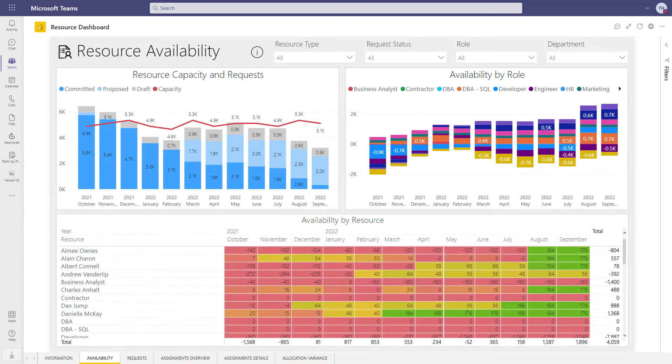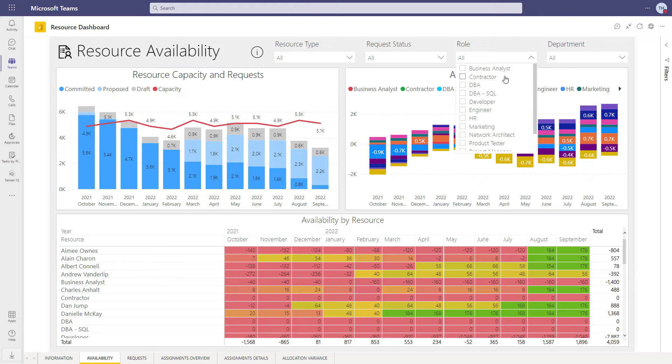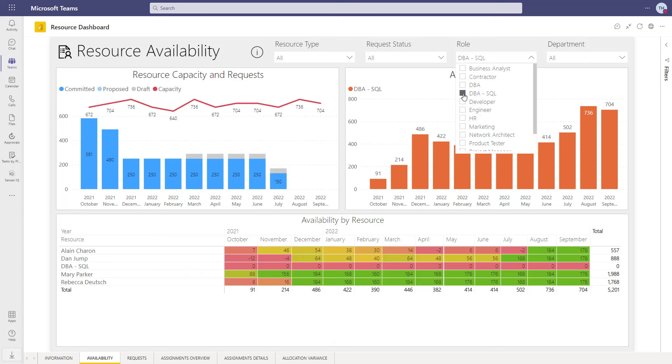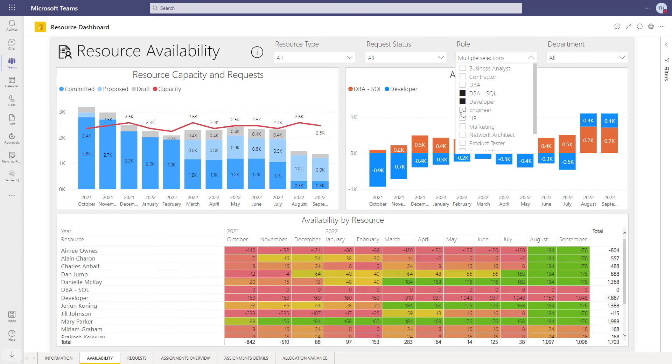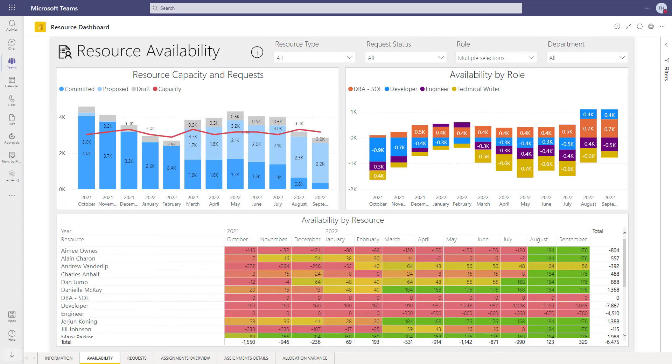For longer-term planning, we want to identify future resource demand and bottlenecks based both on the pending requests from proposals and work already approved and in progress. We typically want to see that demand by role or by department.